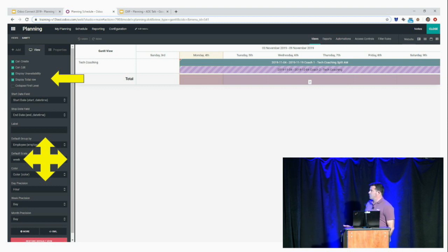So by bringing in Studio, I've now added the total display row below, and you'll see that because I need to see how many projects are going on. This helps with forecasting going forward. I can see that in mid-November, I am swamped with projects, so I can't take any on right now, so I can't deliver those to my customers. So I don't want to overpromise and underdeliver. I want to underpromise and overdeliver. I want time frames to be accurate.